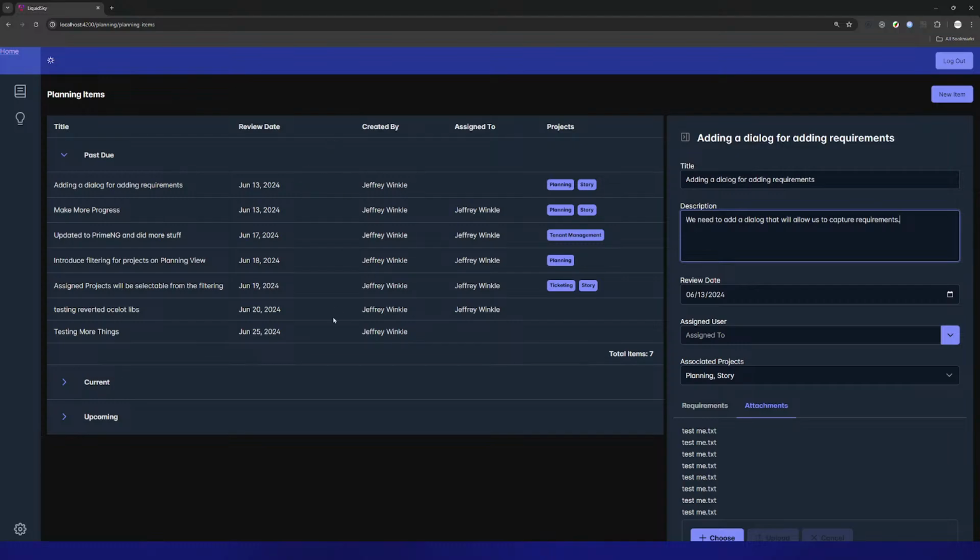But the groomed backlog should allow the product management team to estimate, based upon how many stories are pointed in the backlog, how long it might take to clear that backlog. Oh, they're currently averaging 13 points a sprint. Okay, well, there's 150 points in there. We've got about 5-6 sprints worth of work.